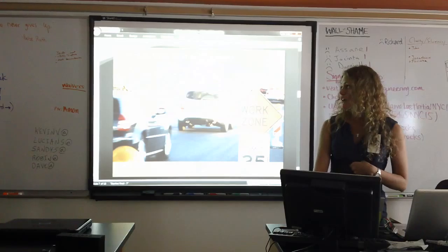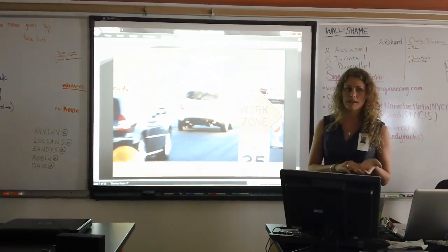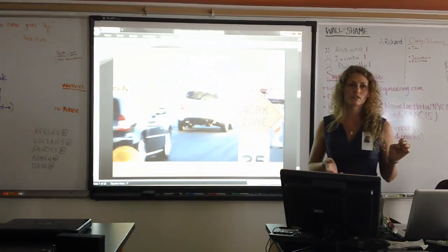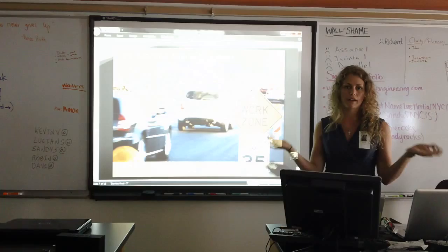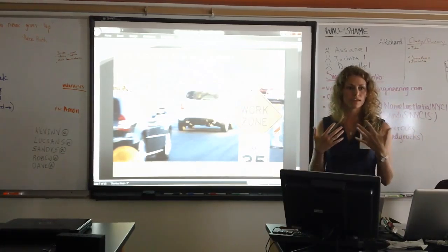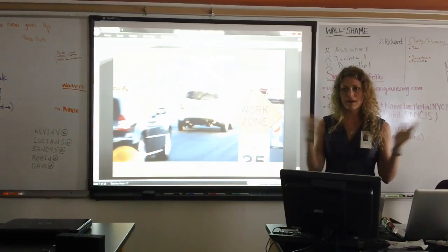One of the things that I work on a lot is something called MPT, and that stands for Maintenance and Protection of Traffic. Any type of construction is going to involve a type of barrier or a work fence that's going to keep the public out and keep the contractors and the work inside, so everyone is safe.